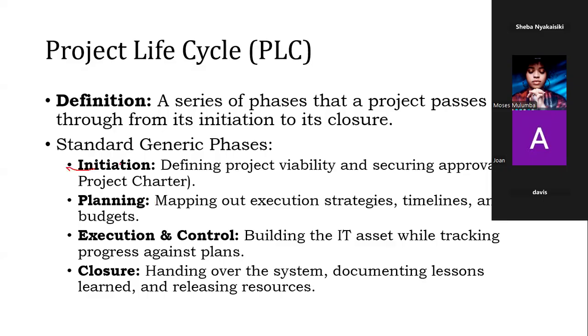The very first stage is the initiation, where the project is defined. What is it going to be? What will the features be? What will it cost? And then at the end of it all, of what use will it be to the organization? What management, what the organization puts in terms of cost, will there be a benefit at the end?